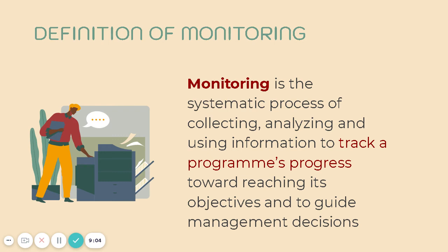Now, monitoring, as you've heard already, focuses on processes. We're focusing on when and where activities occur, who delivers the activities, how many people or entities did we manage to reach. These are all process related questions. Monitoring is also conducted during the program implementation period. Sometimes it is referred to as process evaluation, formative evaluation, or even performance evaluation, and these terms are used interchangeably.